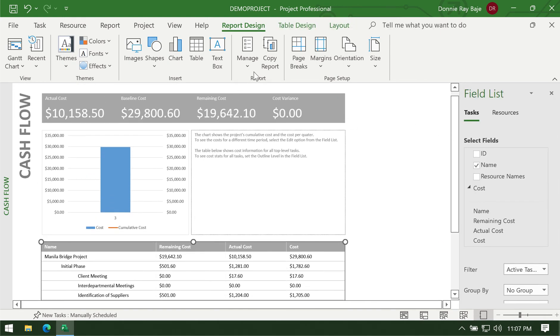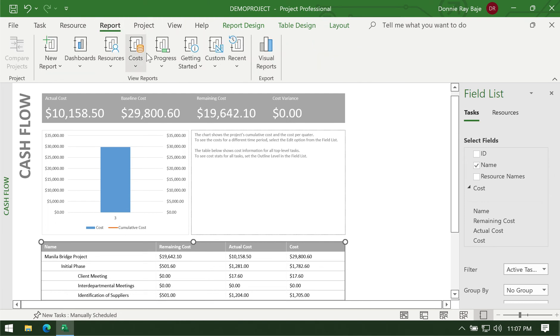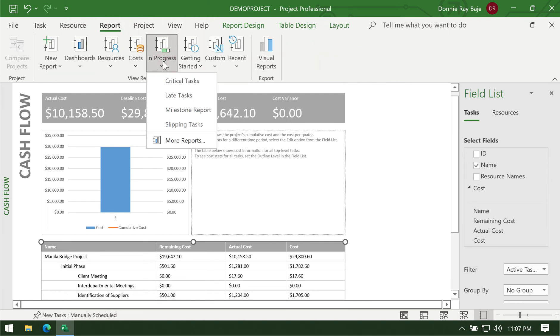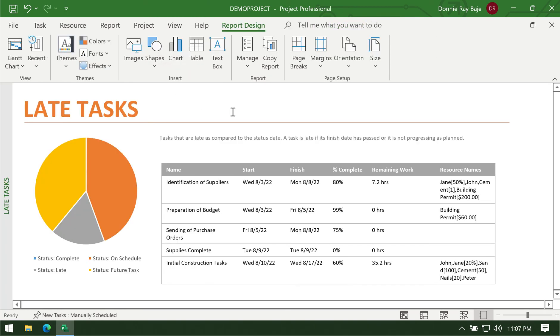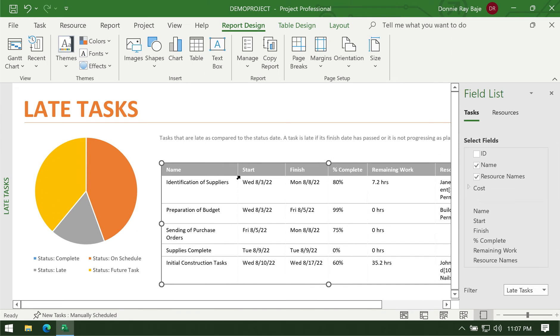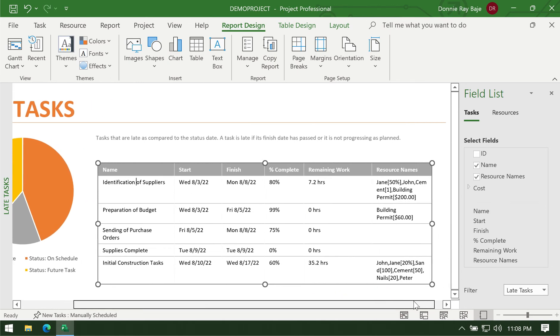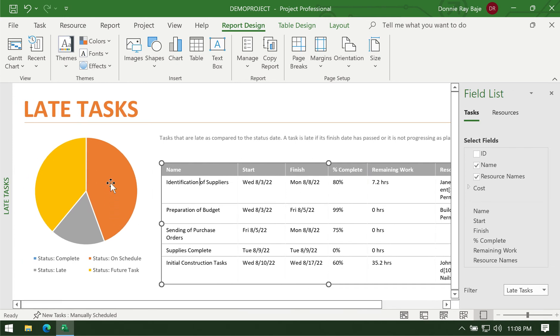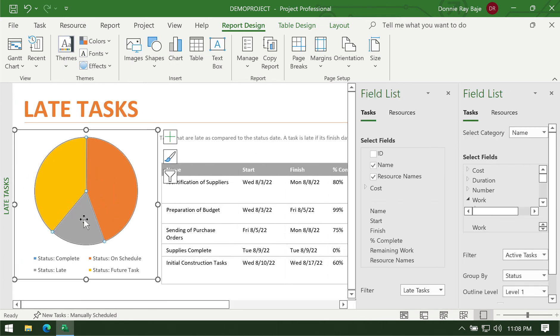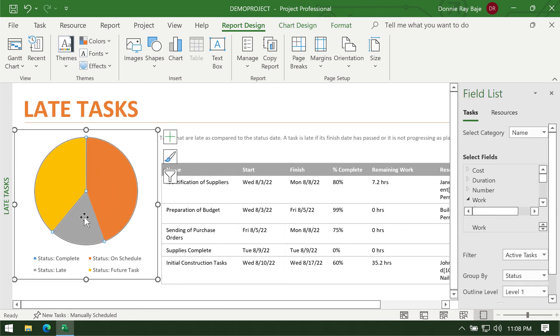Now other reports: we have the in-progress report which is more of like a list of tasks that are late, for example late tasks. So now you have here what tasks are considered late, what's the start and finish date supposedly, what's the percentage completed, how much work still remains, and who are the resources. You have this pie chart here showing how much of the tasks are late, how much are on schedule, and how much are still not yet done, the future tasks.